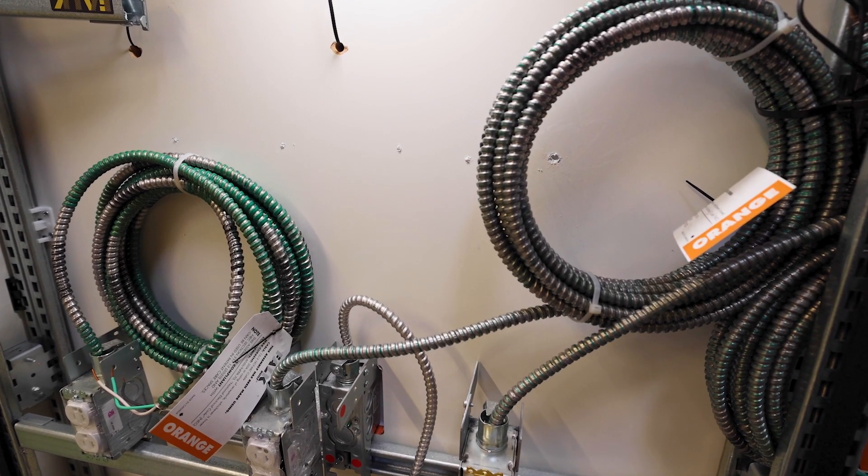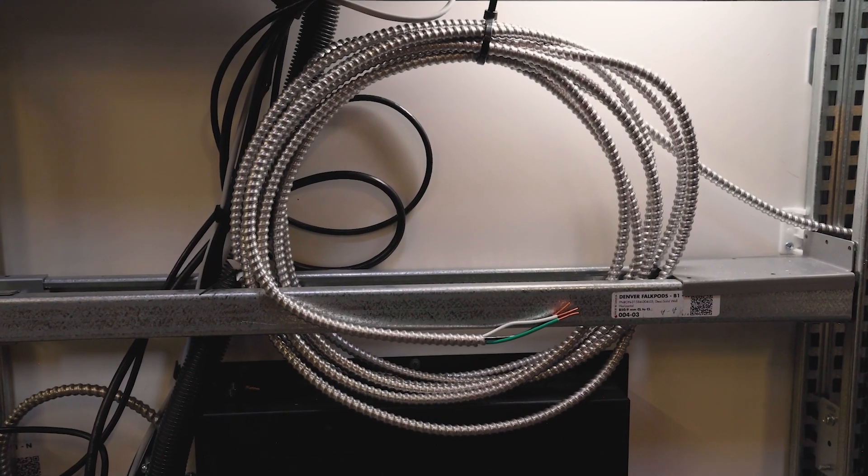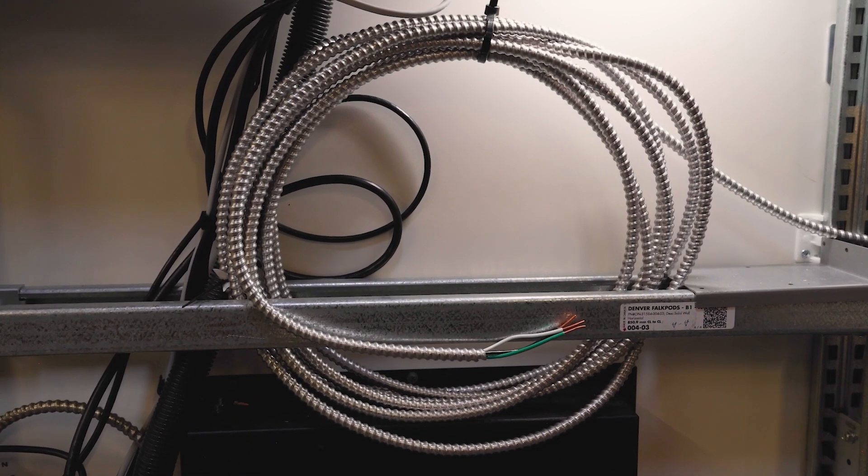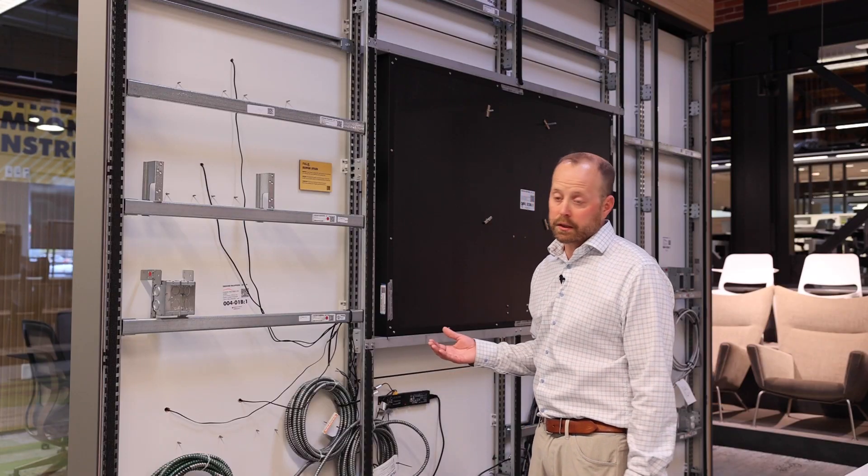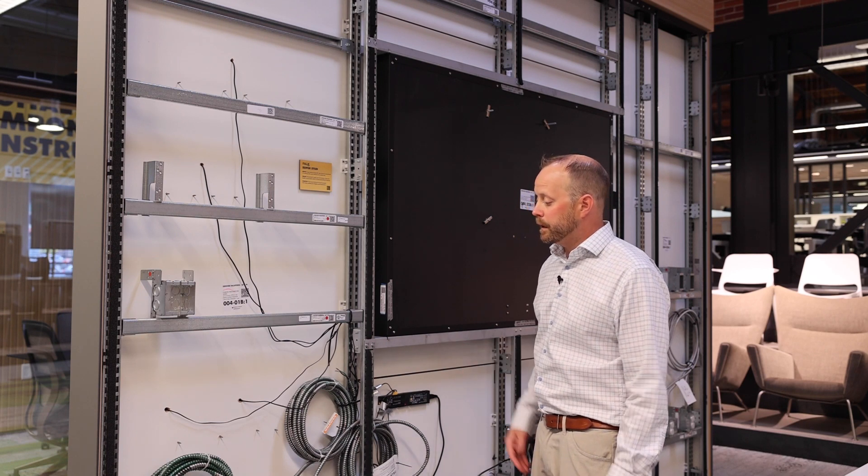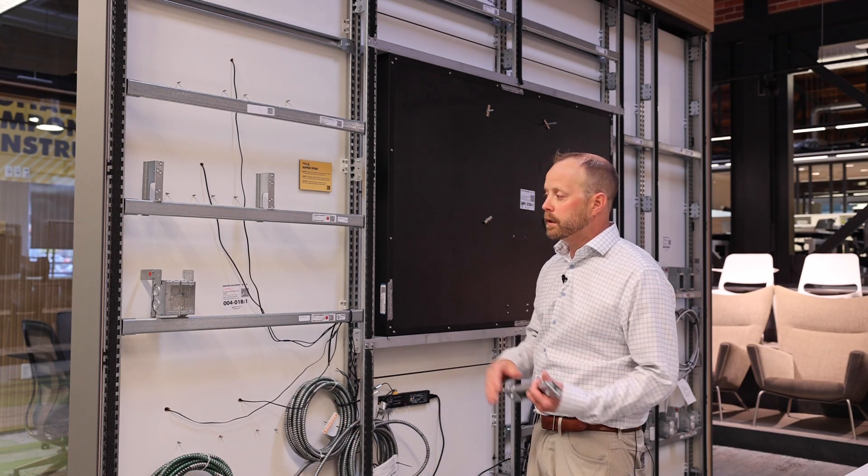The amount of work we're putting in the factory and eliminating on-site is significant. That's going to speed up your overall construction schedule compared to roughing in everything conventionally.